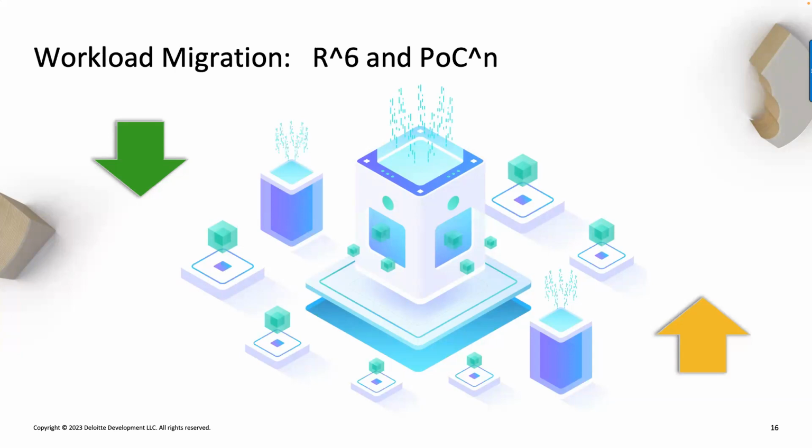They will go into the traditional route of discovering, analyzing, looking at wave groups, move groups, and then finding the interdependencies, the complexities, and move it. And along the way, you need to stay away from migration greed, where you think you can put everything on the truck and just move it to the cloud, right? So these are part of the lessons learned that we do. The top-down one is one of the key lessons learned that we do.